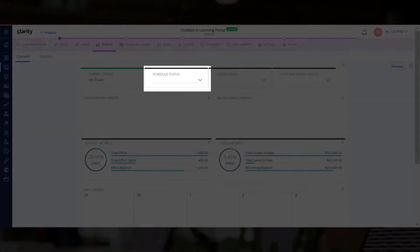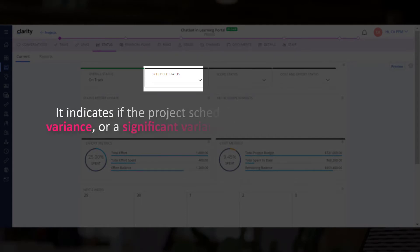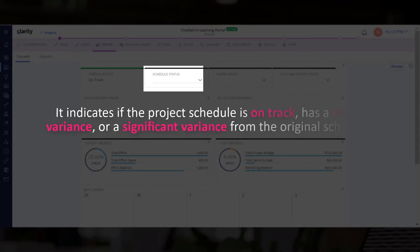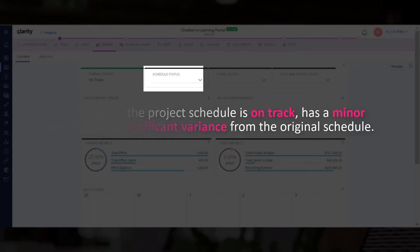Let's start by specifying the schedule status of the project. It indicates if the project schedule is on track, has a minor variance, or a significant variance from the original schedule.